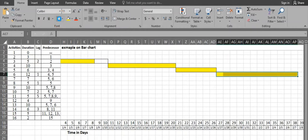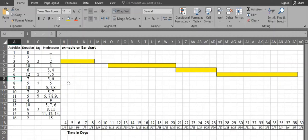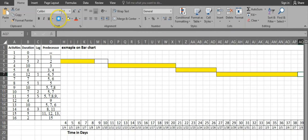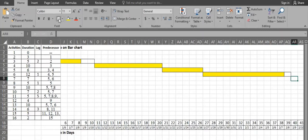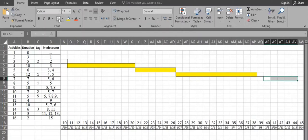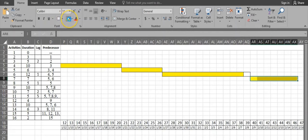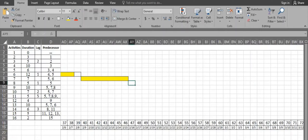Activity 7 has two predecessors: activities 5 and 6. Activity 6 is finishing the latest, and it also has a 1-day lag, so we mark the lag and start activity 7 one day after activity 6 finishes. Activity 7 has a duration of 7 days: 1, 2, 3, 4, 5, 6, 7. Activity 7 finishes on day 46.